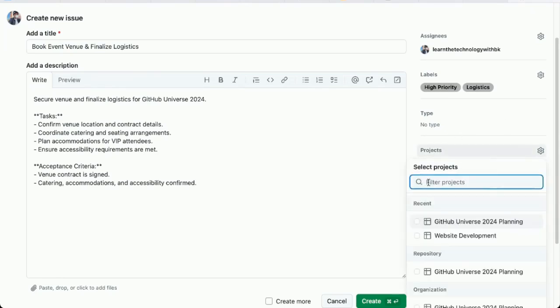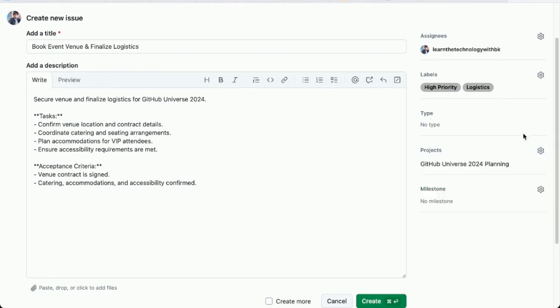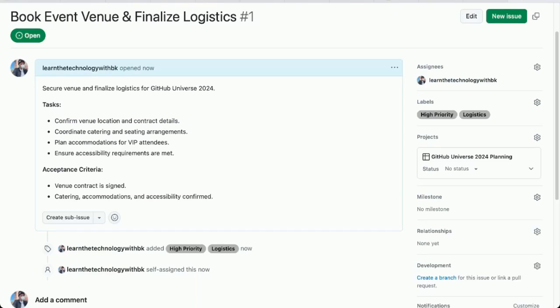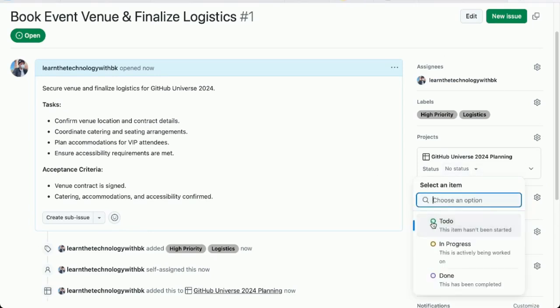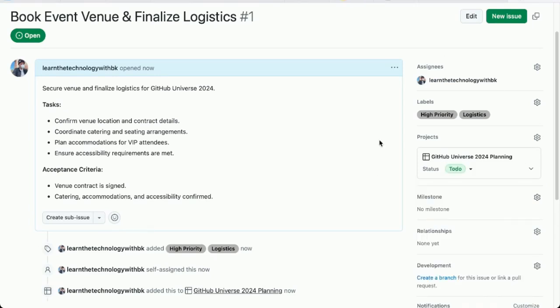And then I'm going to associate this issue with a project. There's my project. GitHub universe planning. That's it for now. There's the issue. I can actually set the status of the issue here. This will actually place it in one of those columns within the project board. I'm going to change this to to do.